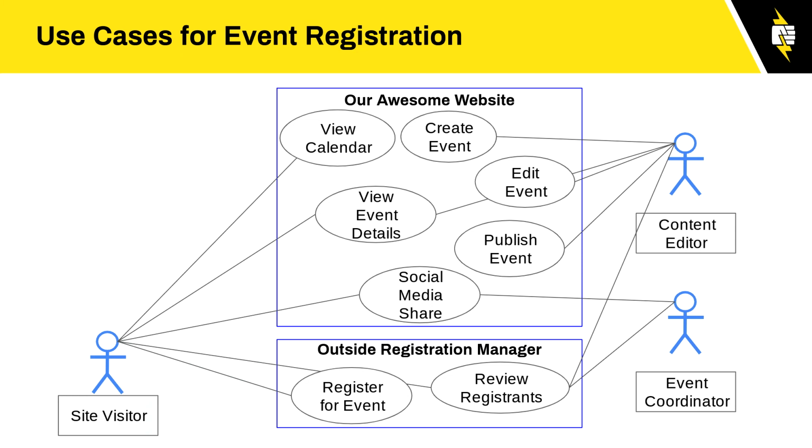I could see, if you had stakeholders who were really, really hard to get time with, you could just work at this level with them and say, hey, this is the functionality we're looking at. You don't worry about the systems, where they're going, or whatever, but just, are these the things you're expecting them to be able to do? Is there anything else that we missed? And if you can get them to sign off on this at least, that gives you something.